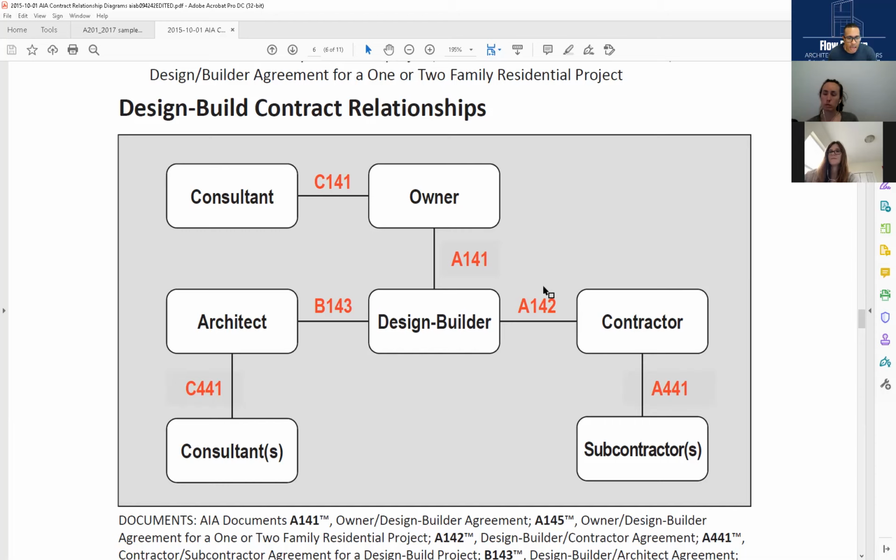The consequences of that are we've got to rip out the floor, rip out all the wall base all around it, level it with concrete, and then put it right back down. We can't glue it because that concrete's not treated for gluing a floating floor onto it. It actually is floating because of that. It's meant to be floating.